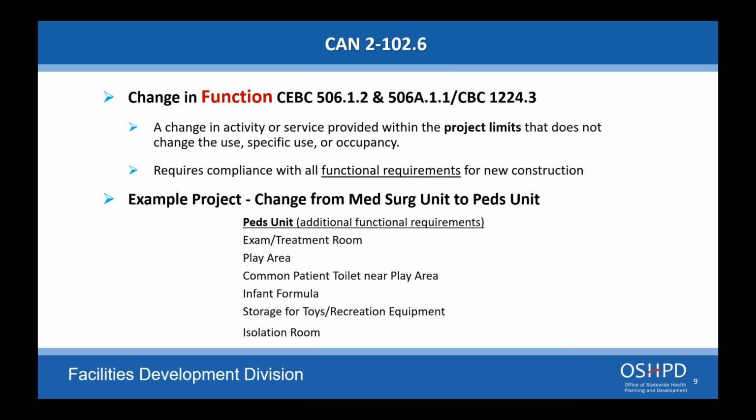But you're putting everything back in kind. That is still cosmetic. Okay, you're just replacing the finishes. And tile's not such a big deal, but like carpet or wallpaper, things like that, there may be flame spread or smoke type ratings that they may ask about.